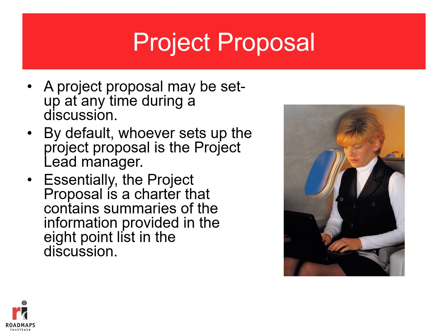So essentially the project proposal is a charter that contains summaries of the information provided in the 8-point list in the discussion. Now, a charter actually has a little more structure to it than, say, a discussion. The nice thing about these discussions, particularly if you did an asynchronous one, is you end up with all the text that you would need to go in and edit and carve out a charter, which is generally limited to about 2 pages.